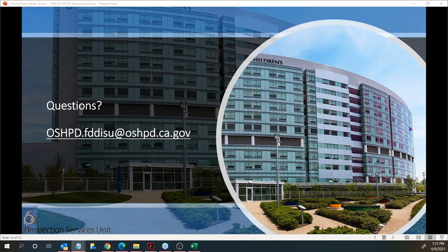So ACD is a material change. I don't know if you have the code available in front of you, but I can guide you to 7-153, if I'm not wrong. There are two different types of change. One is a material change, which is the ACD, and then there is a non-material change, for which you as an architect will issue an ASI. Both need to be signed and stamped, and per code, you need to keep a log of these changes. Both of them need to have the Delta, cloud, everything.